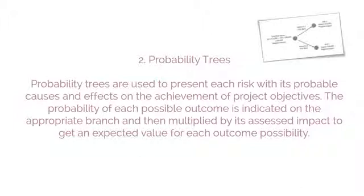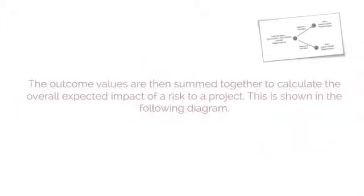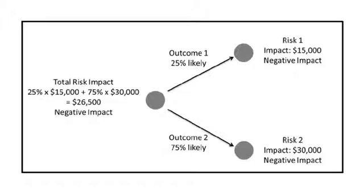Probability trees are used to present each risk with its probable causes and effects on the achievement of project objectives. The probability of each possible outcome is indicated in the appropriate branch and then multiplied by its assessed impact to get an expected value for each outcome possibility. The outcome values are then summed together to calculate the overall expected impact of a risk to a project, as shown in the following diagram.